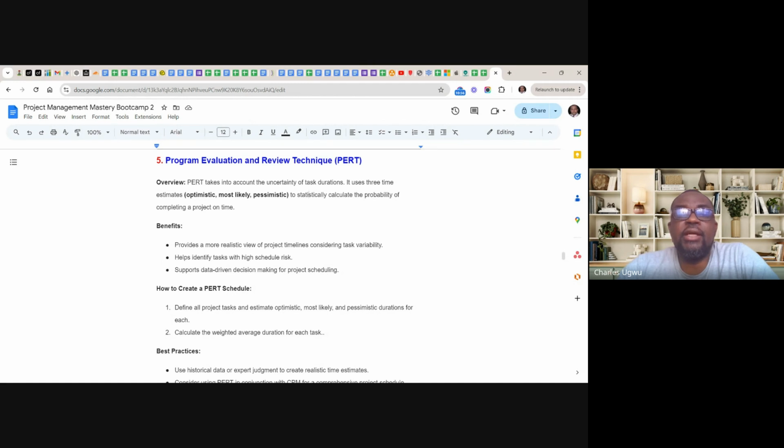So like I said here, we are trying to understand how to estimate a duration for a task. That is what these parts help us to do. It is a technique in project management. You call it PERT, PERT analysis. What they mean is that they use 3 time estimates to plan each task. So they will find the most optimistic, the most likely, and the most pessimistic.